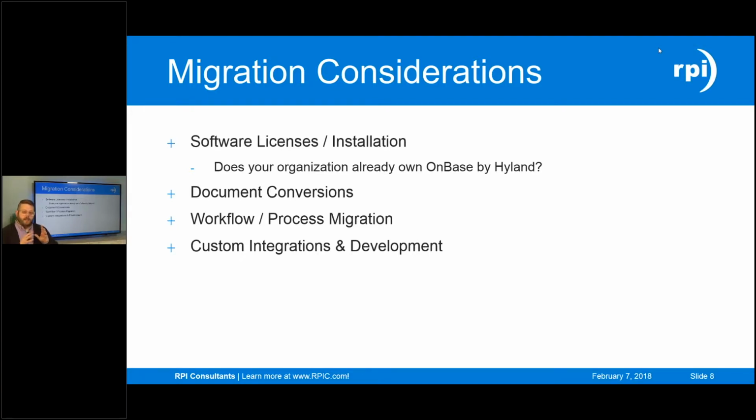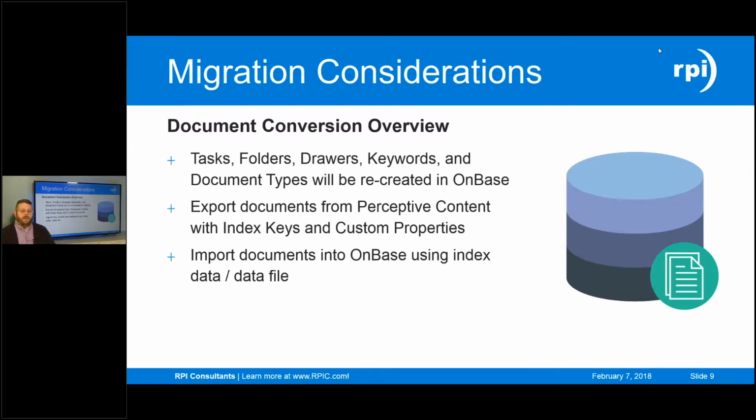You want to look at the actual document conversion itself. That's step 1. You want to look at the workflows and processes and how those will migrate to the target environment. That's step 2. And then you want to look at your custom integrations or custom development, and that's the 3rd point. So first, on document conversion.